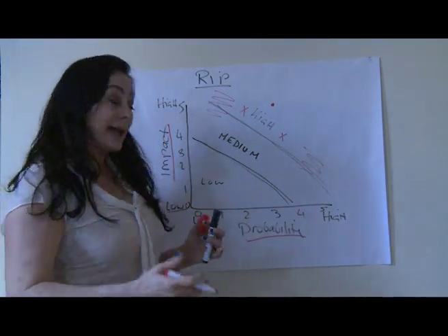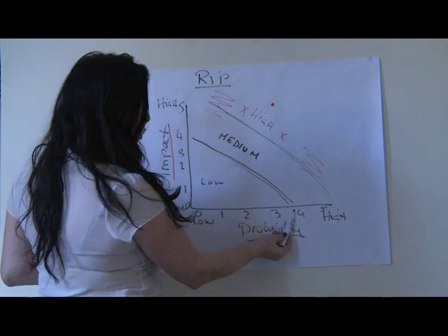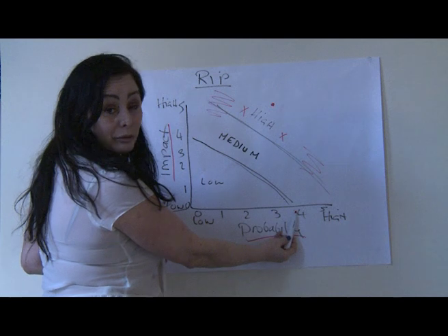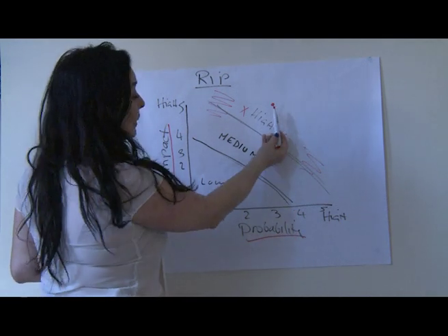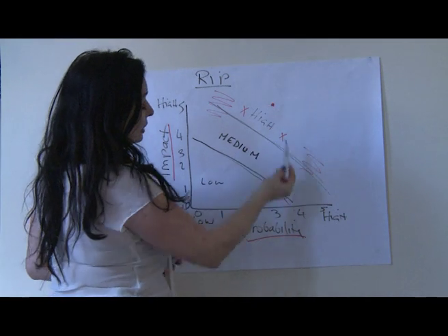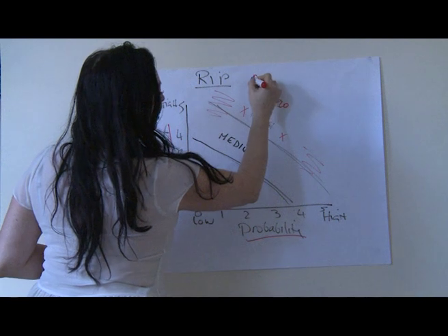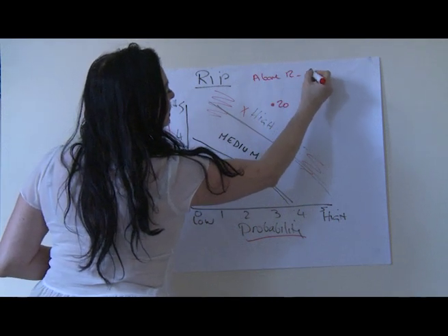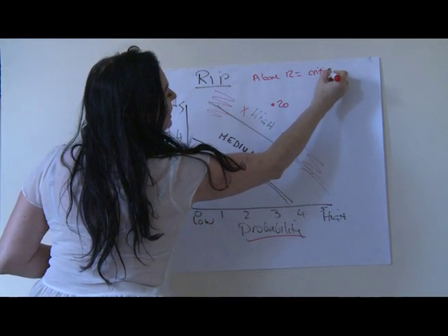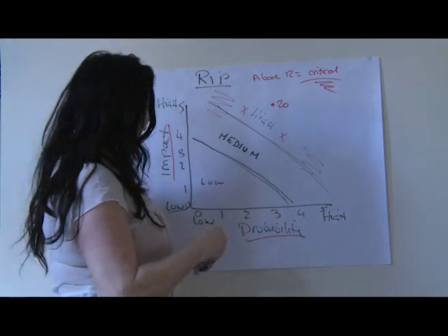So then we work out, we multiply the probability by the impact. So 4, the probability of it raining in the UK, by the impact of it stopping filming, 5. 4 times 5 is 20. Anything above 12 is critical. So we have a critical score here.